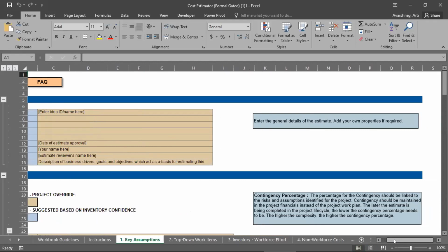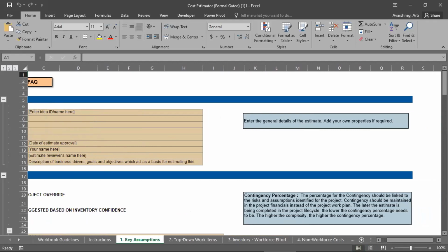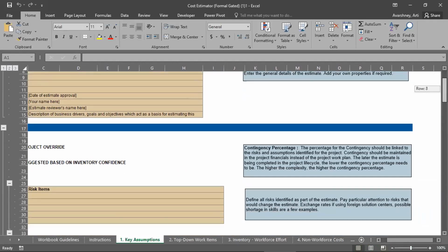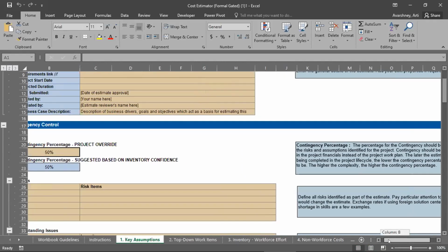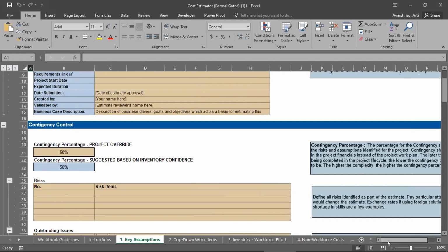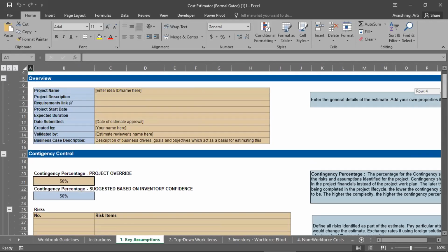As project managers, we know that any cost estimate that we are providing is nothing but a rough order of magnitude at this stage. That means you are estimating the project cost with the available information, with available knowledge about the requirements and a possible solution that can complete those requirements. So your confidence level can never be 100% at this stage. That's right. This is the first stage, the creation concept. The business case you are preparing here. At this stage, your confidence levels are never 100%.